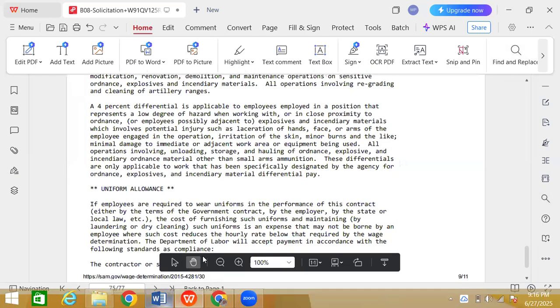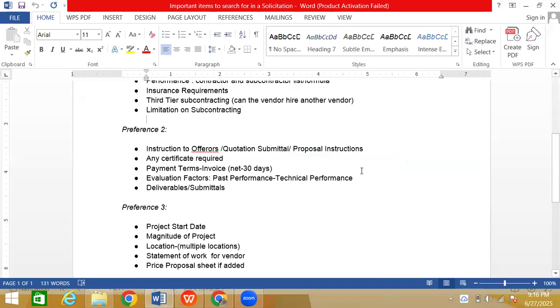Now let me just tell you what payment terms mean here. So basically, when the work is done, you get paid, right? This is basically KSNL getting paid from the client, and then we pay our subcontractor. So whenever government payment terms are mentioned, you do not share that with the vendor. Why? Because we do not want any direct contact of the vendor with the client, because we're kind of like a broker in between. Okay.